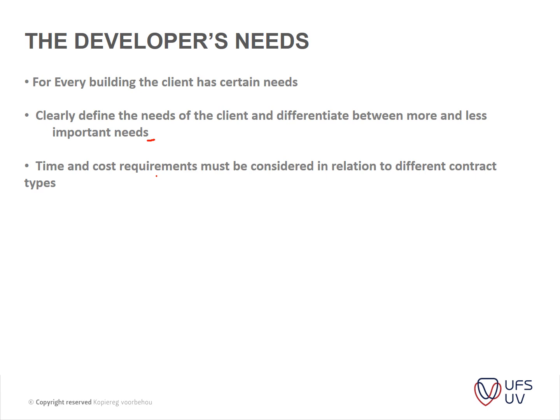Obviously there will be a cost percentage added to the contractor going out and doing all of those sections for you, but you don't have the extra burden of going through the design process, and it might take longer. So one has to consider what approach to this development, and the contract in the end that will be used will also influence the way that cost and money is spent on a project.